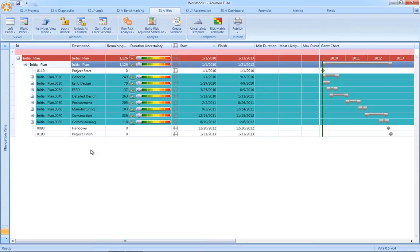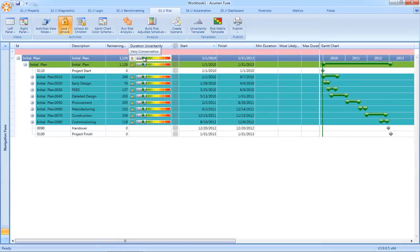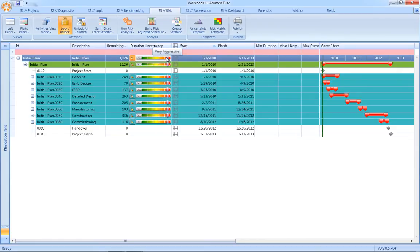Previously, in order to apply uncertainties, we would have to define complicated and very time-consuming three-point estimates in the form of minimum most likely maximum durations. Well, that complexity has been completely eliminated now in Acumen Risk. Instead, we use the uncertainty factor. Simply take the sliders as you can see here, and adopting a top-down approach as we apply the uncertainty factor, you can see here that the factor is cascading down through the entire schedule.